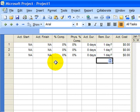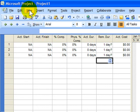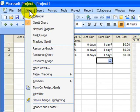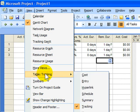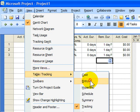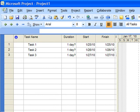All of these are task-related information. You remember when we began, all we were looking at was the Entry table to show you columns of information related to entering of the tasks. But this is not where you'd be tracking the project. It's on the Tracking columns, and certainly not where you'd see variances. You'd see those looking at the Variance columns, provided you set the baseline.